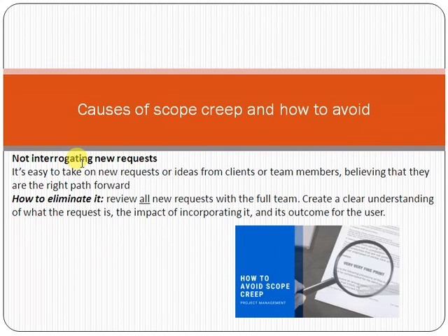If it is not a part of the scope, you have to upfront ask them, you should upfront tell them that it is a new request and it will be managed through the change request with additional time and cost. So how to eliminate it: review all new requests with the full team, and create a clear understanding of what the request is and the impact of incorporating it, and the outcome for the user.